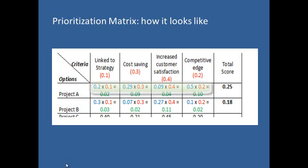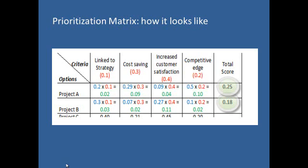When weighing criteria and rating projects against the criteria are completed, project scores are calculated by multiplying criteria weight by project rating, then summing up the scores for each project throughout all criterion. The total score for each project will determine its ranking relative to other projects, which will help us decide the best project to initiate. Obviously, it is the project with the highest total score.